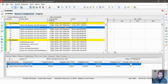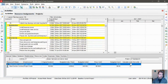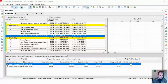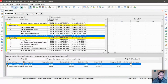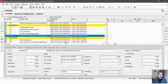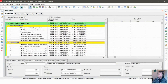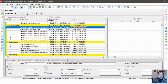This is important — you don't want fractional stuff to ripple through your projects. So if you don't turn on the clock, all this stuff causes problems. You'll see it in your data date at 11:59 p.m., and even your constraint dates can get affected. How do we fix it? It's a manual effort. You have to go back and find the earliest activity that started screwing things up and fix that, and hopefully that ripples through. You do have to use your eyes and ears on this one.